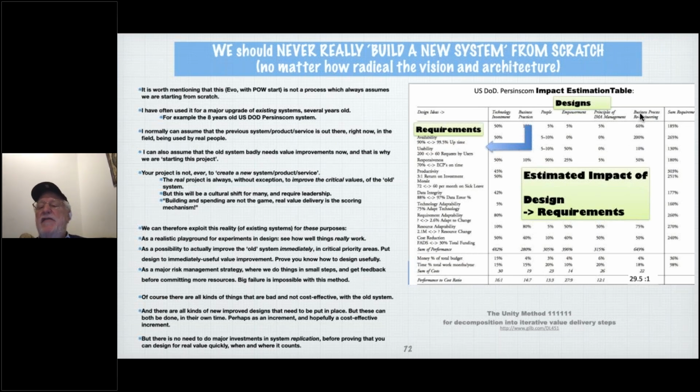And we found a subset of business process reengineering which could deliver slightly improved availability next week, we thought, but in fact, it was so simple they actually got it the same week as we did the overall planning. The actual thing they found was that if they prioritized by rank of officer asking questions, by moving them to the head of the queue, they got much higher availability of the system. Oh, and I shouldn't get into the detail of that. But they actually found something they could do next week, which was so simple they did it this week, that they could start delivering results.